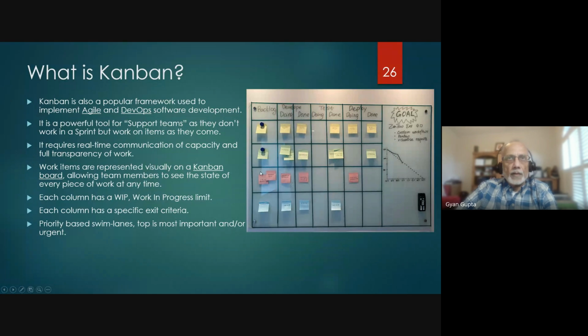that gets presented here. So somebody like the product owner will define what we need to do. The product owner we talked about last time is the person who works with the business, and they keep looking at what they need to work on, and they keep posting little stickies virtually or electronically in our Kanban backlog board, right? So these rows are called swim lanes. The swim lanes are typically created by priority. We'll talk about that as well. So high priority items on top, low priority on the bottom, right? That's why they're color coded.